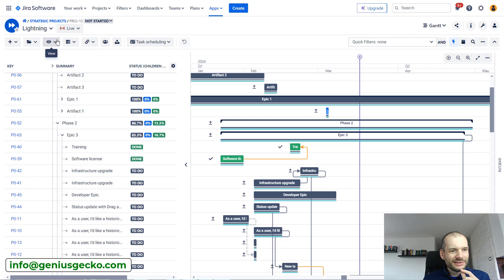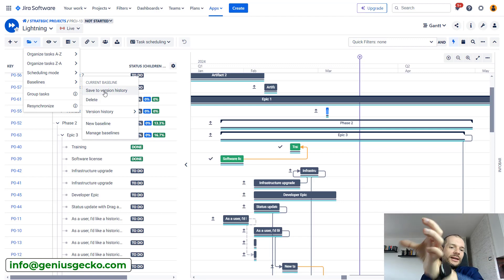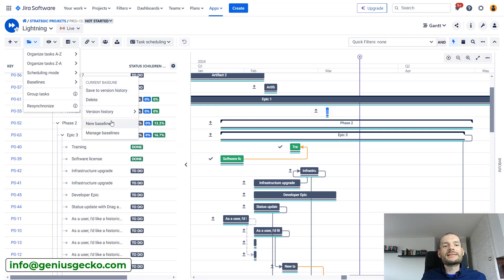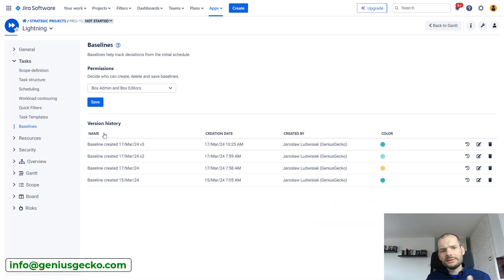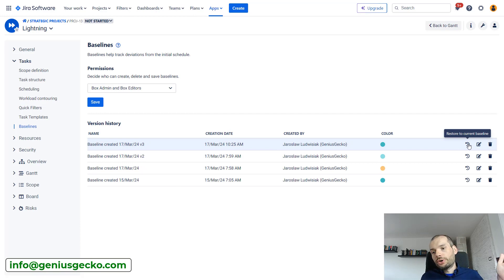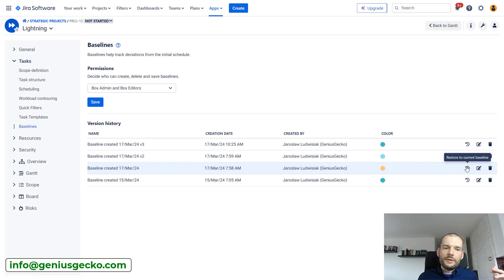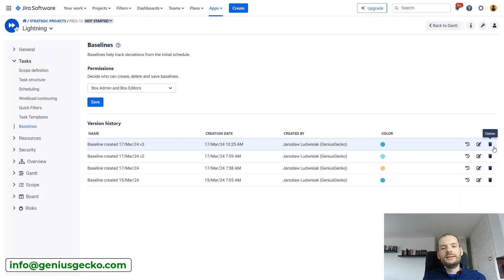Returning to the feature itself: you have options to save to version history, create a new baseline (which overrides the baseline start and end date field values), and display version history. You can also go to Manage Baselines, which shows a list of all your baselines. From there you can restore a historical baseline as the current baseline — which will overwrite the current baseline values — and you can edit the name, change the color, or delete a baseline.